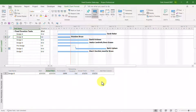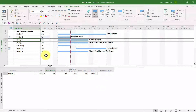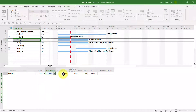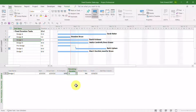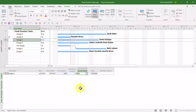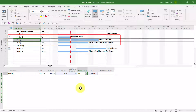Our next scenario is when you increase the remaining duration of a task. I'll select the Design C task and enter some progress. The team member started on the 27th as planned and finished 50% of the work as planned, but Dave expressed concern that he won't be able to finish in five days and has requested an extension of two additional days. If I increase the remaining duration to seven days, Microsoft Project does not display a warning dialog this time, but it did change the duration of this fixed duration task from 10 days to 12 days.